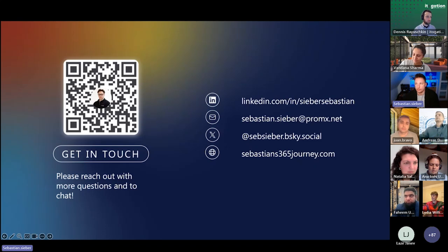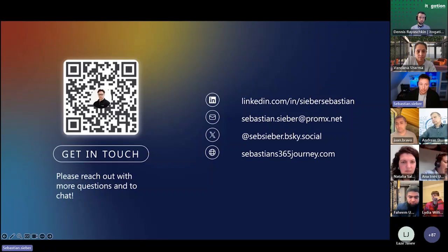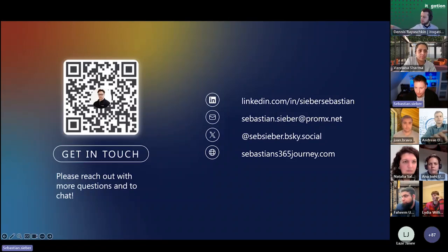You can do the scheduling from a project manager view, but you can also have a centralized scheduling agent, for example. This runs by project, but you would see an overview, for example, that Anna is scheduled on multiple projects at the same time. You would not see that while you're requesting that resource, but you will see it in the resource scheduling board overview, and when you're searching for the skilled employee you need. Hopefully this is okay as an answer.